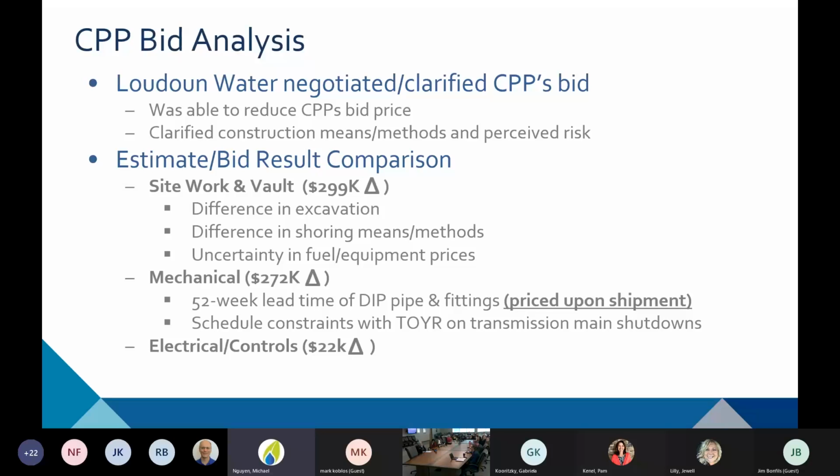That was the engineer's professional opinion and interpretation of that information during design, and the contractor simply disagrees with that, or, again, means and methods is looking to provide some increased shoring, or has built in more risk mitigation for rock excavation or whatever it may be. But we did provide and analyze that information during design.